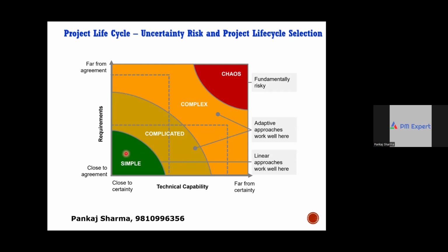See, a simple project is a project where requirement and technical uncertainty is very, very less, right? Now, for these projects, you can follow predictive or waterfall approaches to manage the project. Is that fine?